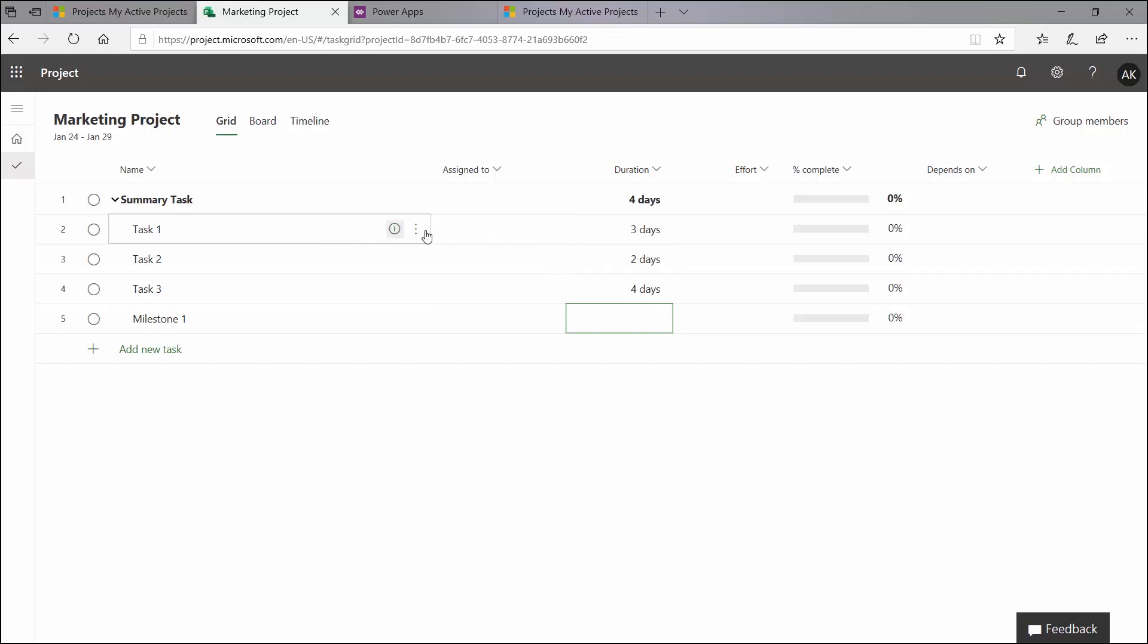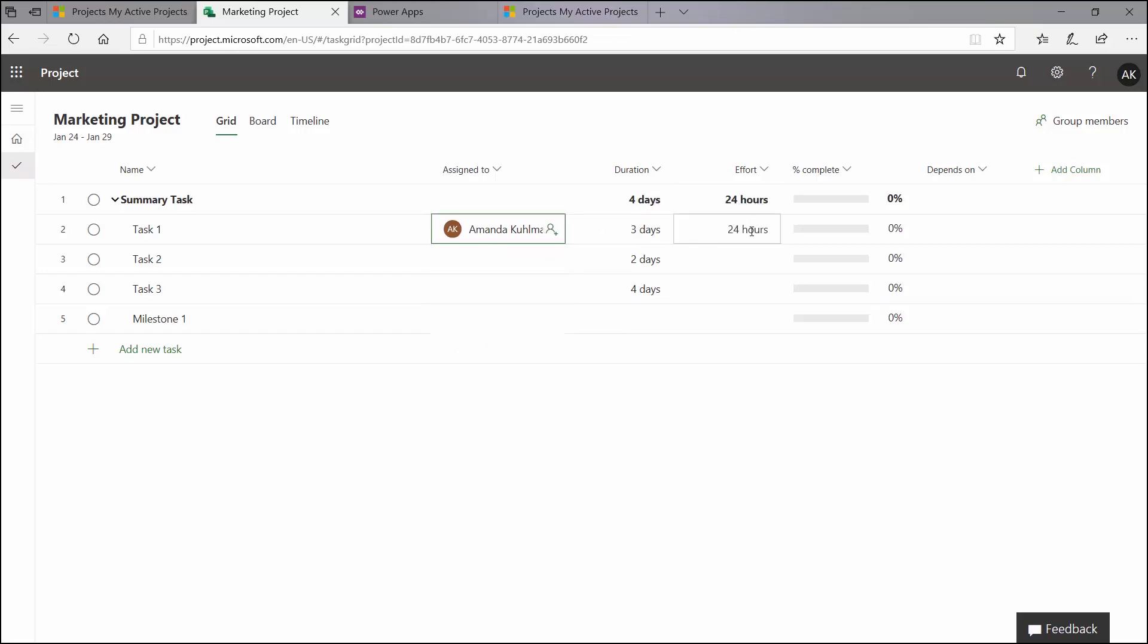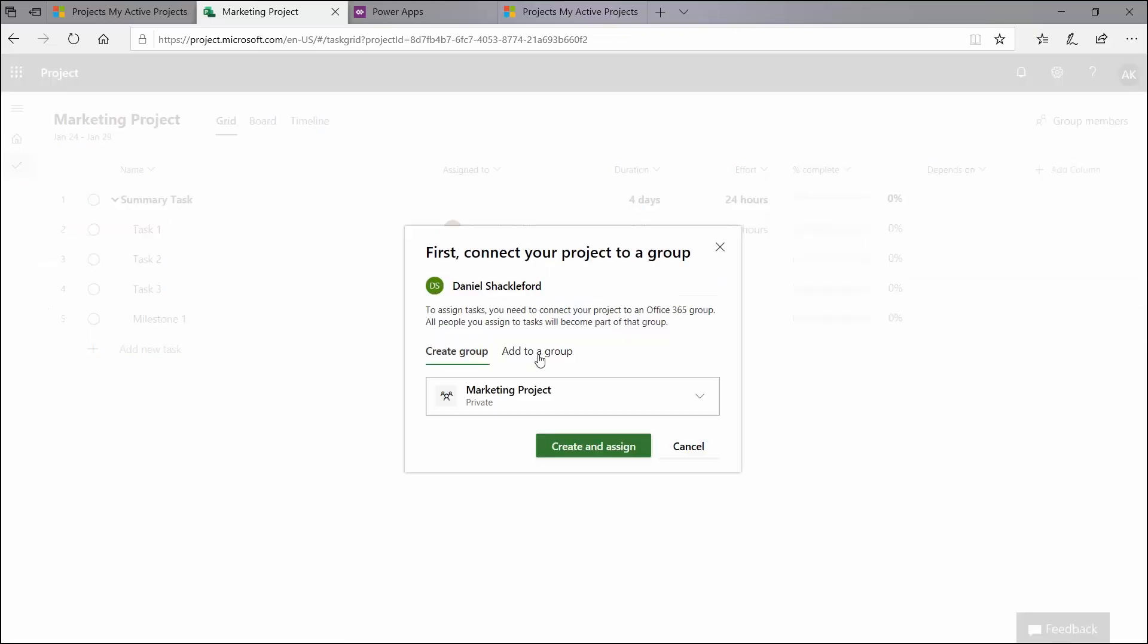So I'm going to go ahead and assign some resources here. I'm going to click on Assign Task to a Resource. And by default, I am the only person on this team. I can assign this task to myself. And when I do that, it will automatically generate some effort. Project for the Web does use the typical eight hours of work per day for a resource by default, and so it does update that. I'm going to add another resource. And if I'd like to add somebody who is not yet on my project team, I'm just going to type in their name. As long as they are in the O365 environment as a user, then I'll be able to populate them here.